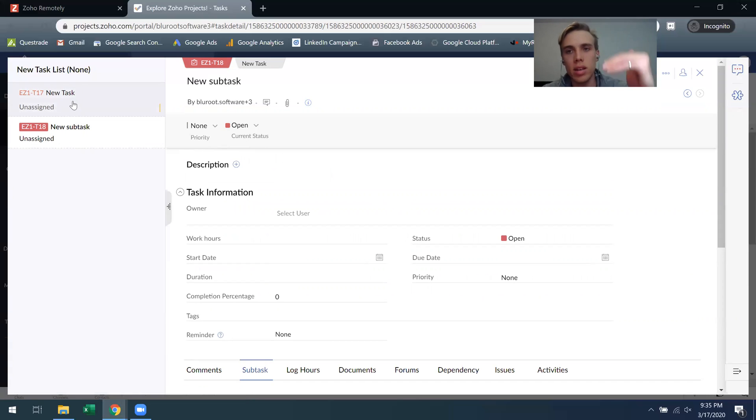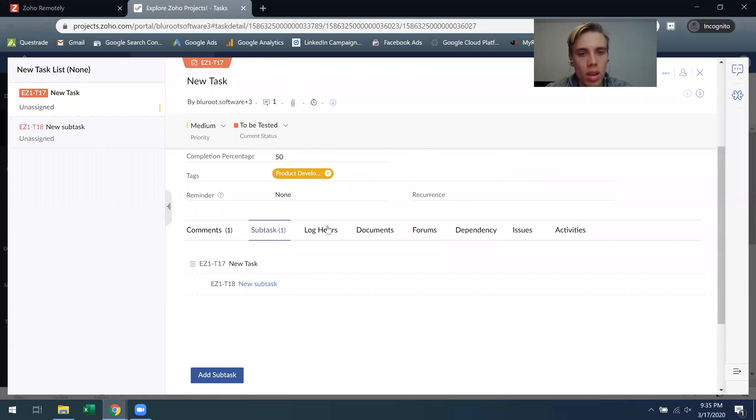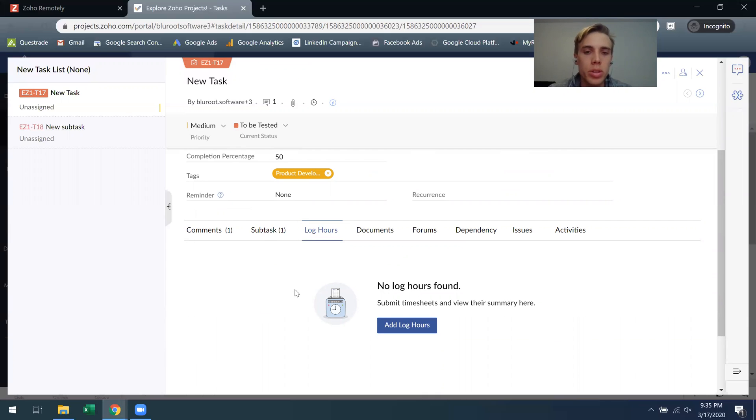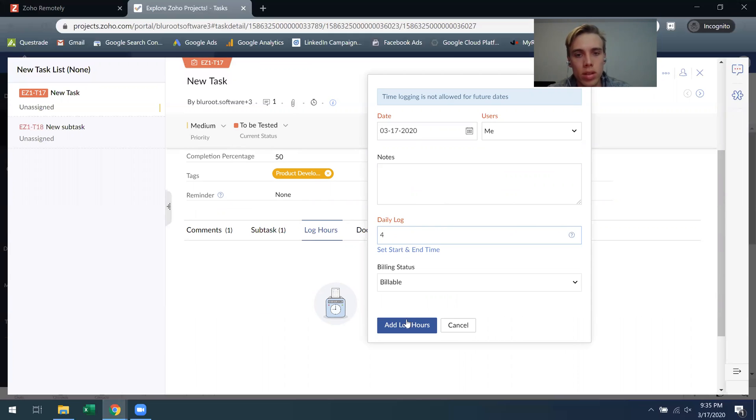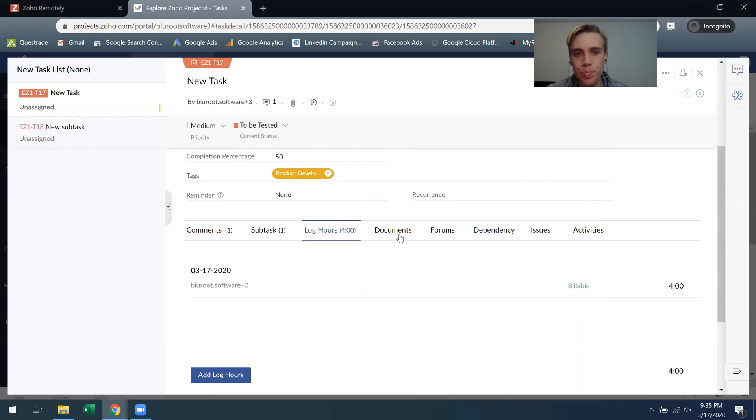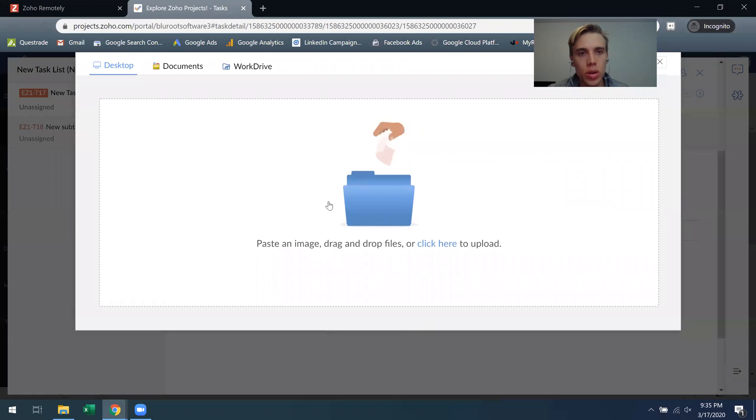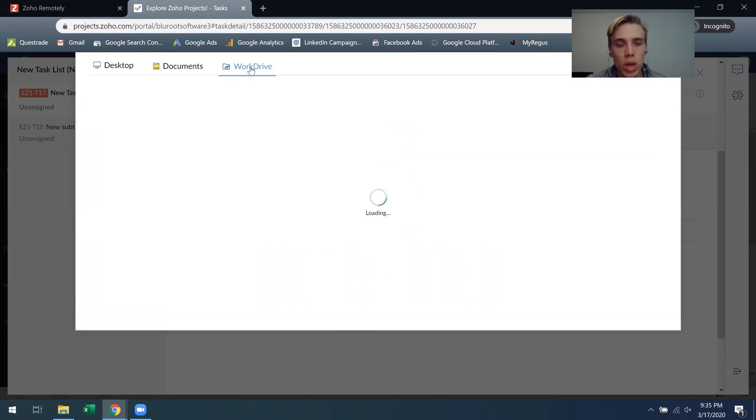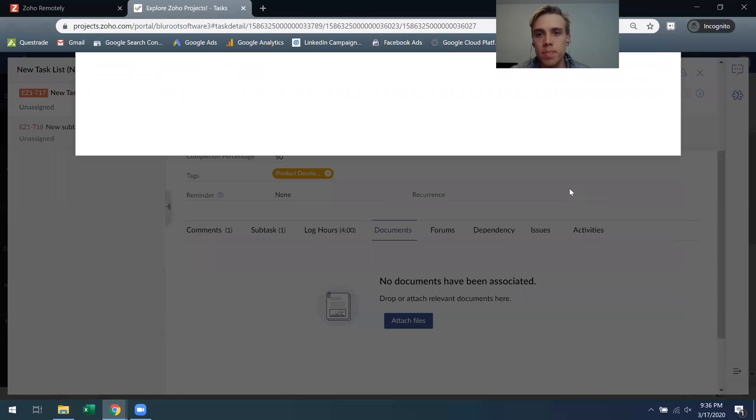Log hours is an important one. If you're a billable type company and you need to keep track of how many hours you're spending on each individual task, that's what you can do. So I can say today I spent four hours on this task and I can add those hours, and that'll roll up in all my reporting documents. You can attach files so you can just grab things from your desktop or Zoho work drive if you guys use that, and all that can come in to the particular task.